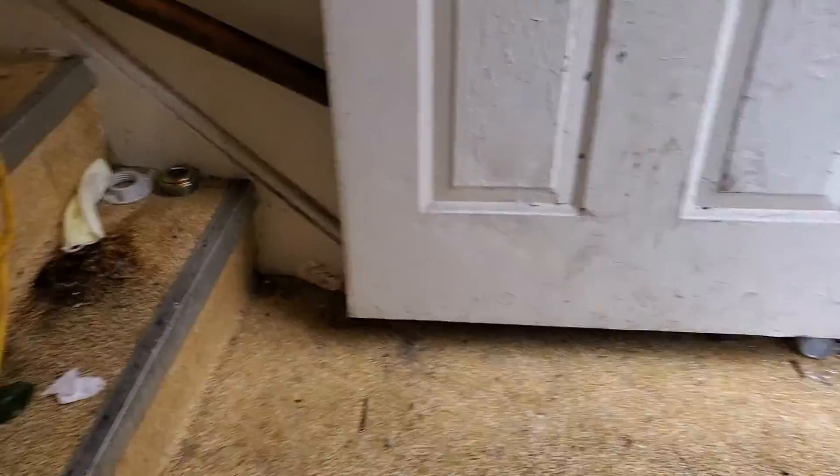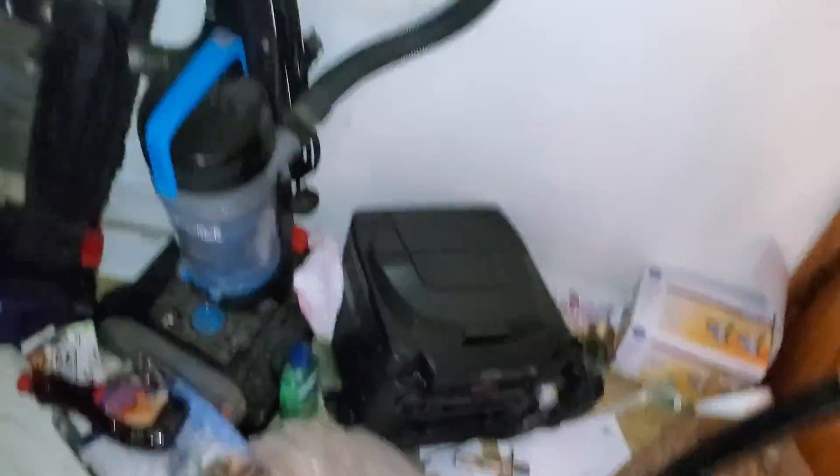Hallway common area: remove all the trash, paint all the walls, paint all the trim. Remove the carpet on the steps. Replace the outlet covers and light switch covers. Going into the bottom unit, going to need new blinds for the front.